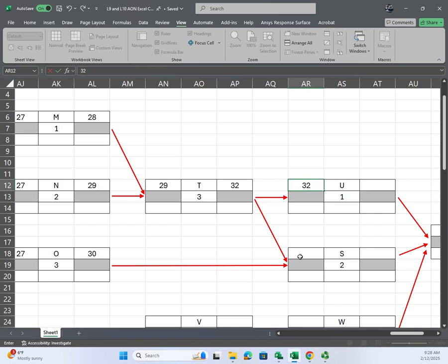Well, welcome to old age. How many copies of things was this reproduced from and didn't get straight? I'm going to go with T. Okay. So literally we got a 32 here because it's got to be the longer of the two dates. So that makes this one 34. This one's 33.